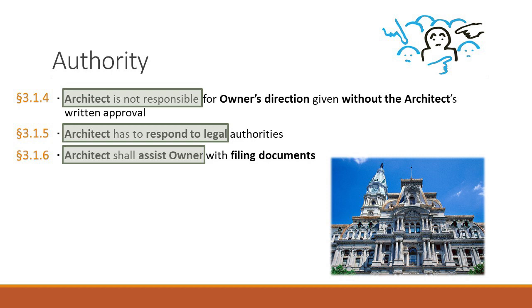Basically, this is saying, while I'm your agent in some places, owner, while I'm trying to be loyal to you, if you are out there giving a directive or a substitution or you're accepting non-conforming work, that's your problem, not mine. So this is a provision that was obviously added to this agreement at some point in time because some owner tried to put the blame on an architect.